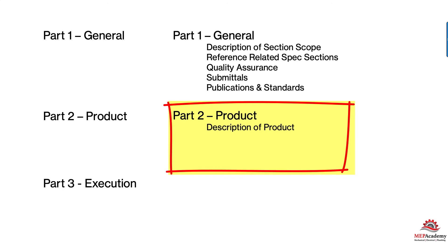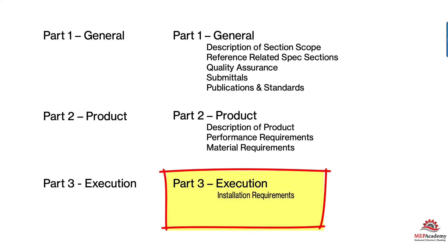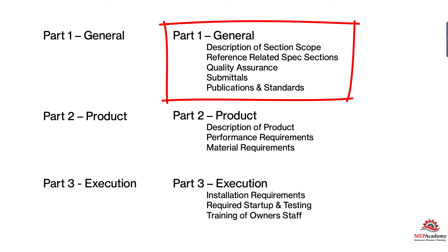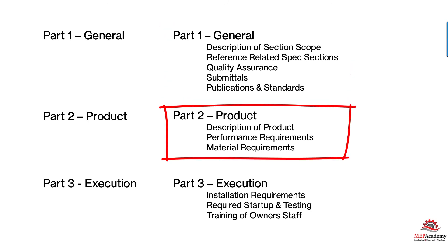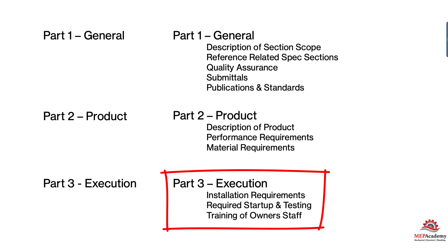Part 2 is Products — it describes the product and its performance requirements, material requirements, and standards. This is where the meat of the spec will be. Part 3 is Execution — installation requirements, fabrication, startup and testing, and training of the owner's staff. So Part 1 is an overall description referencing standards and publications. Part 2 describes what the product must do and what it's made of. And Part 3 is about how to install it, start it up, test it, and train the owner. These are the same in every section of the spec.